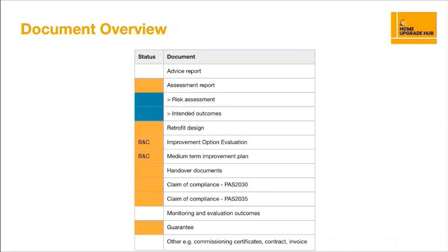So, for example, retrofit design, that's not just one single thing. There's likely to be a lot of things nested beneath that, including things like the evidence of your designer's qualifications. So it can be quite a time-consuming process, and you'll need to work with your retrofit coordinators to make sure that's costed for accordingly. All of this lodgement goes into something called the data warehouse, and that is something that Trustmark house.